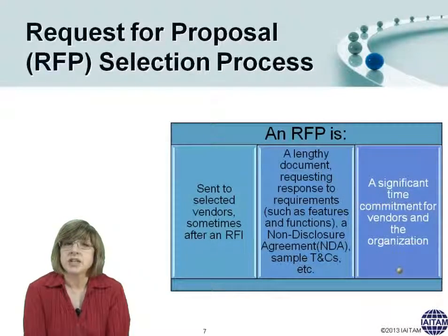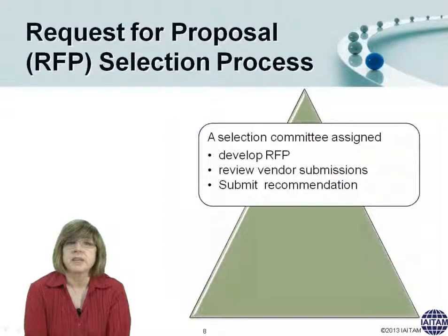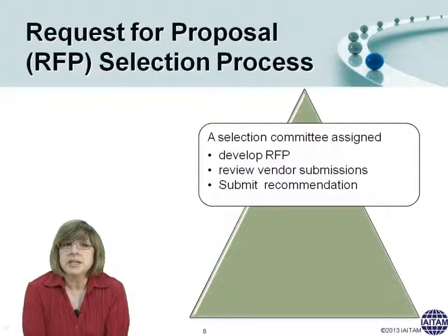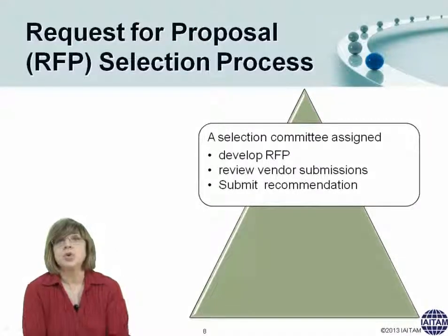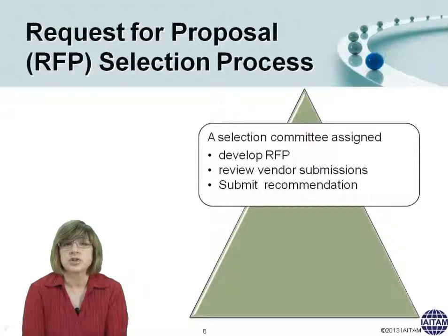So treat both sides of the equation with respect when it comes to an RFP. There should be a selection committee assigned to look at the RFP results. They will review the RFP, review the process, and submit their recommendations as to who would be or should be the vendor of choice based on their view of the world.